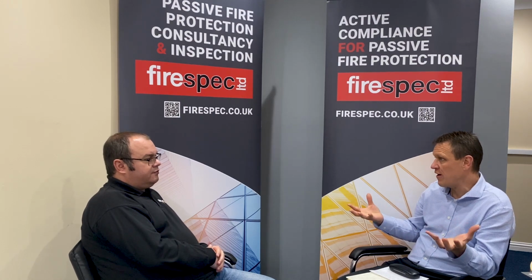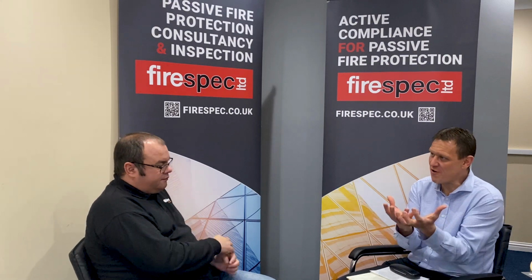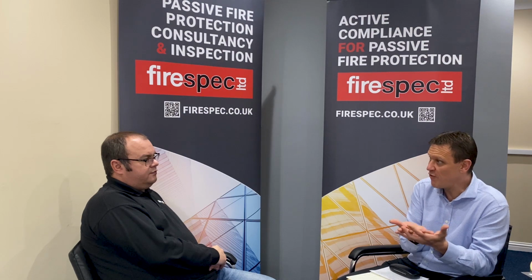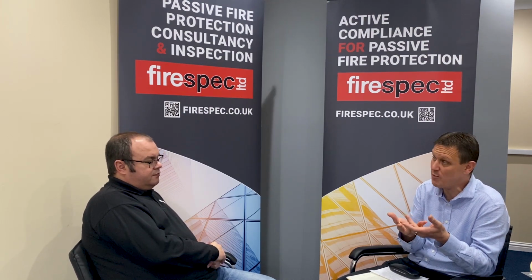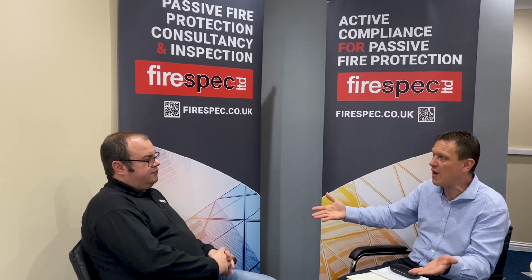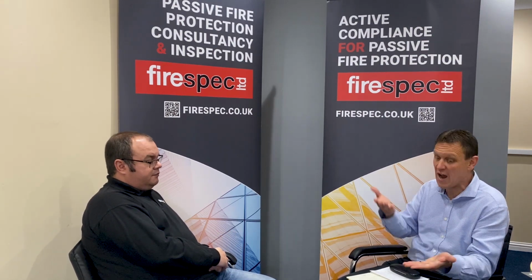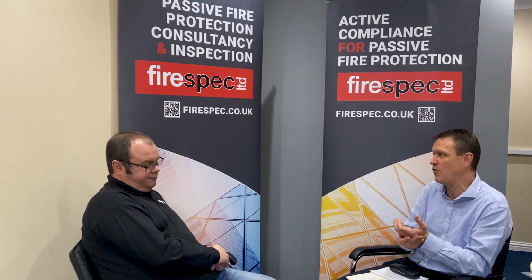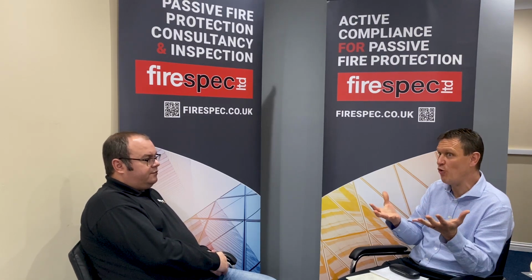Hopefully the way it's going to work is that the Building Safety Regulator won't allow, that's that first safety net, isn't it? The Building Safety Regulator is going to catch those that don't have the relevant skills, knowledge and experience and the right behaviour. So hopefully a lot of the tier 2s and these developer builders will get caught out trying to build higher rise buildings, and they will never get through Gateway 2 because they won't be able to demonstrate how they've got that experience and how they're able to employ all of the functional aspects of the building and regulations. They have to be able to do that now under the Building Safety Act. So if they can't do that, then hopefully that will weed them out.